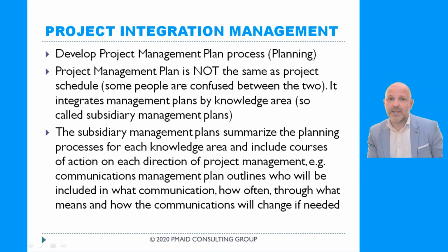Project management plan is not the same as project schedule. Some people confuse, but it's not the same. It integrates management plans by knowledge area, and those plans are called subsidiary management plans. Those plans can be included in the overall project plan document as chapters, or they can be referred to from the project management plan that includes just some of the subsidiary plans.